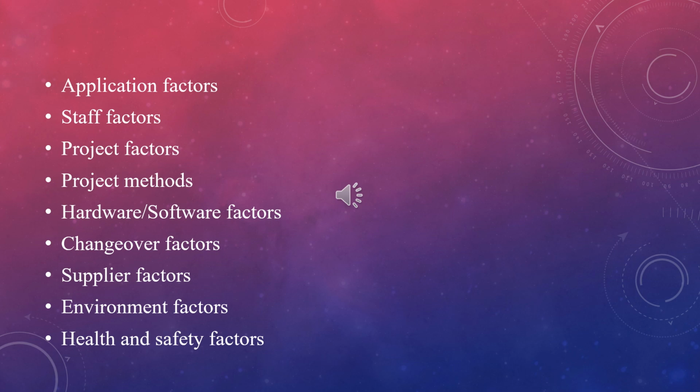Every project should include an audit of the specific risk before work starts, and that audit update should be scheduled as part of the overall project plan.